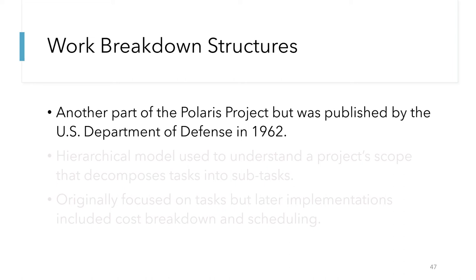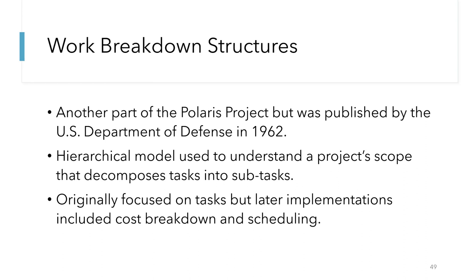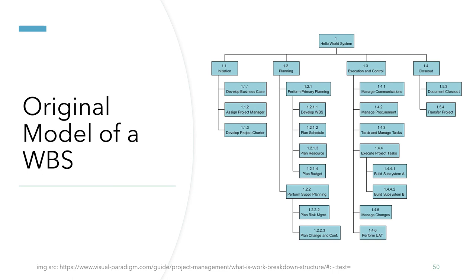Another important tool for project management is the work breakdown structure. The work breakdown was developed by Frederick Taylor, but was improved and used during the Polaris project. This technique became very effective for project management and was published by the Department of Defense in 1962. A work breakdown structure is basically a hierarchical model used to understand a project's scope by decomposing tasks into smaller subtasks. Older work breakdown structures looked like hierarchical trees, while more modern ones tend to look more logical and also include features such as cost breakdown, process ordering, and scheduling tasks.